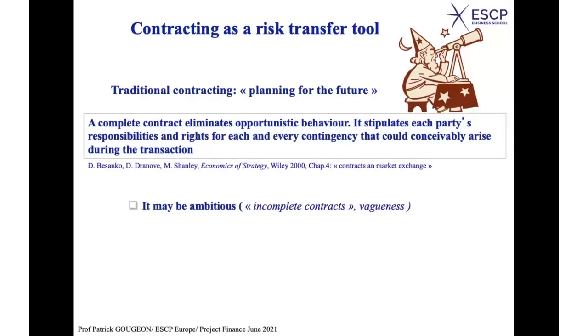Because there was an engine, and the client said that the power was not like it should be as stipulated in the contract. The problem is that the way the measure of the power should be done, as stipulated in the contract, was so vague that they couldn't agree on how to measure it. That's an example of vagueness which took 10 years to be solved with very expensive lawyers.